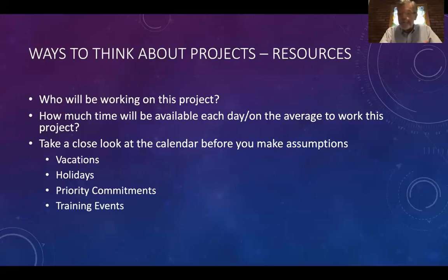So an example of that, anybody who's worked in high tech and has worked with contracting or firms in France knows that if you try to get anything done between June and August in France, good luck. It's probably not going to happen. And the reason is the French are smart. They go on vacations. They reduce their stress. They have laws. They have to have at least 6 weeks vacation paid a year. Everybody. So trying to get things done in the middle of summer in France is a tough call.